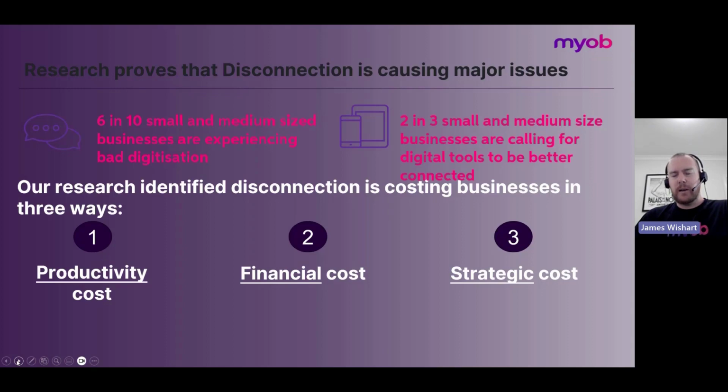They had no idea how many tests they had, and it didn't help that the finance department had this idea as well, without coordinating with the health department, and also decided to try and procure rat tests in the private market. So that original $3 million budget blew out to a whopping $580 million of taxpayer money that was spent on COVID rat tests.